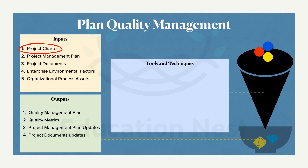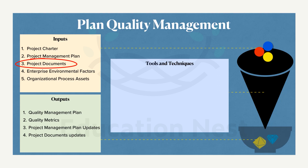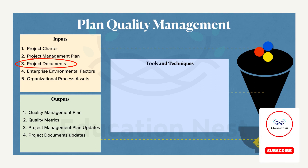Looking at the inputs, we need the project charter to know the success criteria. The project management plan is also an input, but you don't need to use the complete plan — you can use components like the risk management plan, the stakeholder management plan, and the requirement management plan as a basis for Plan Quality Management.